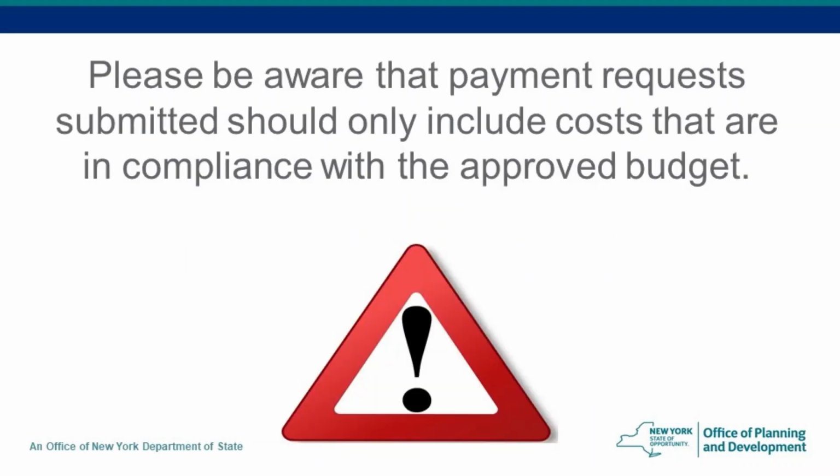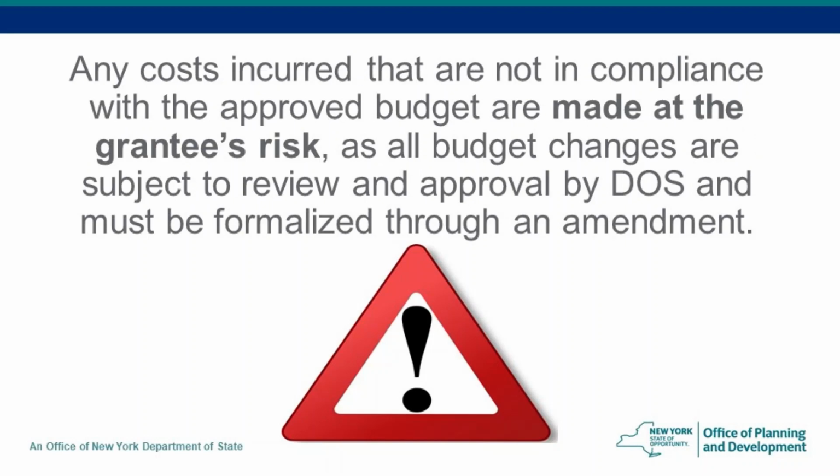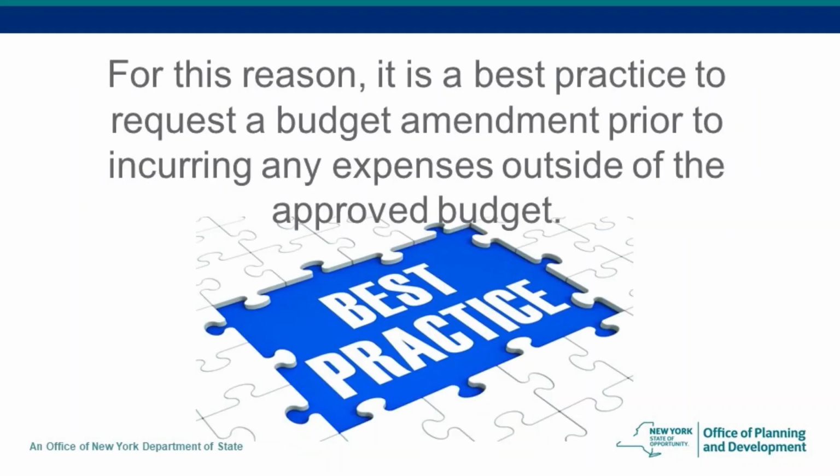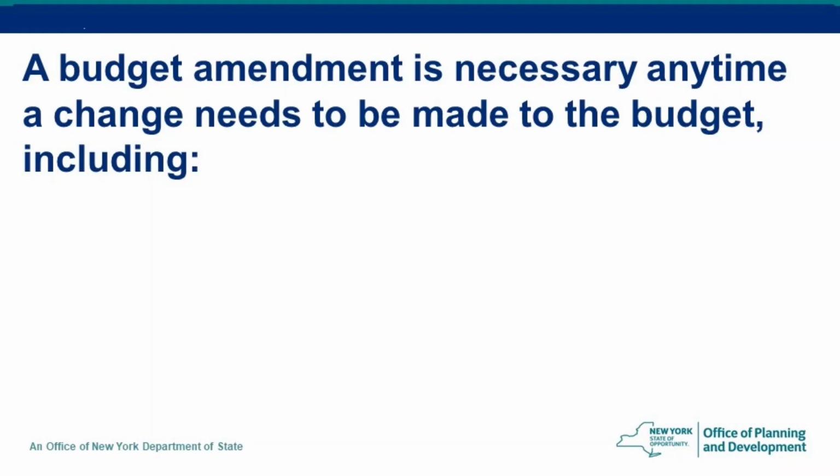Please be aware that payment requests submitted should only include costs that are in compliance with the approved budget. Any costs incurred that are not in compliance with the approved budget are made at the grantee's risk, as all budget changes are subject to review and approval by DOS and must be formalized through an amendment. For this reason, it is a best practice to request a budget amendment prior to incurring any expenses outside of the approved budget. Next, we will discuss when a budget amendment is needed.